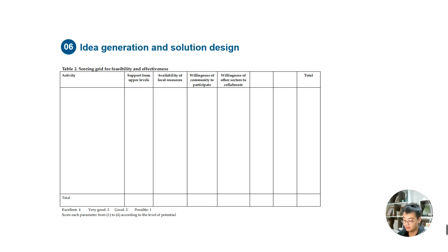The parameters used include available resources, willingness to engage the community, willingness to cooperate with other sectors, like Table 2.